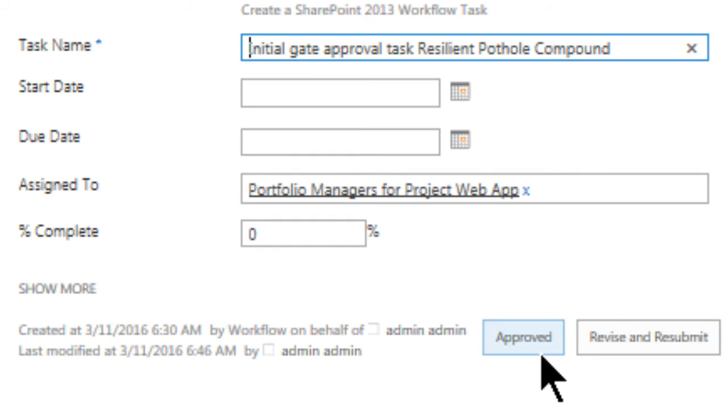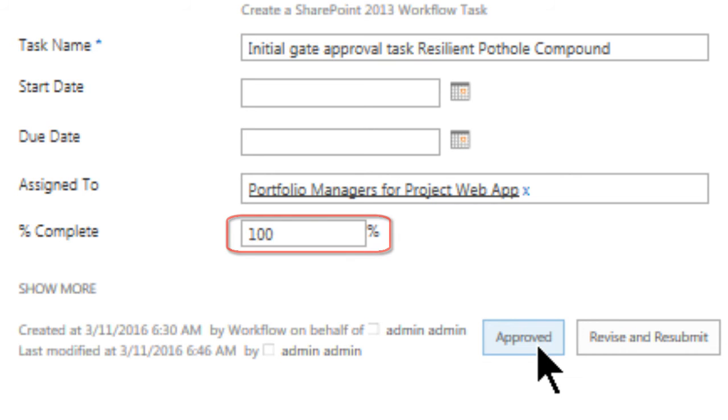Here we see our task name, start date, due date, and the percentage complete, for which we can edit. Once we click Approve, down here, it will set it to 100%.